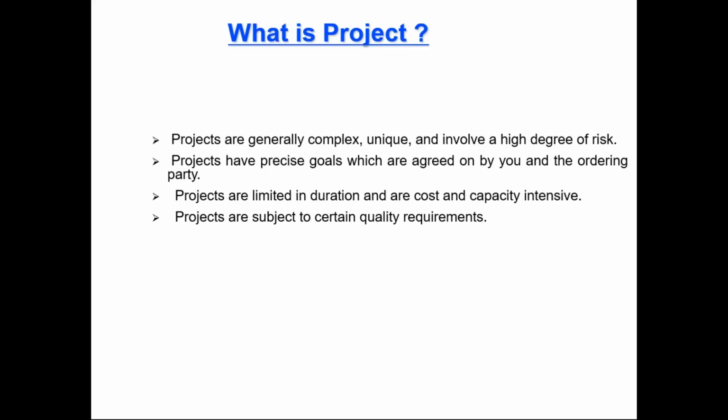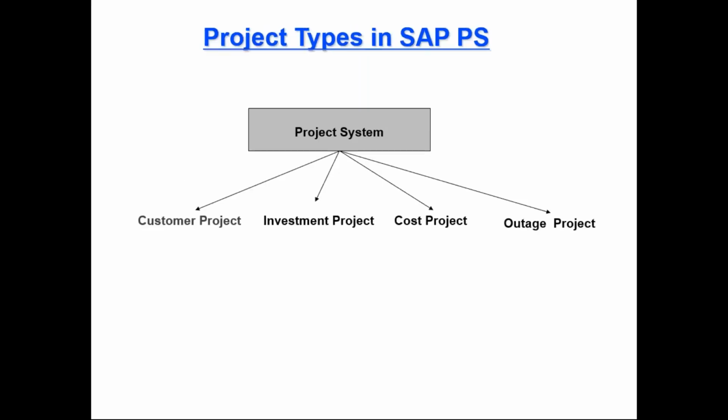So when we are going to start any project formally, I'm saying formally, at that time we should have the project charter clearly defined, which will have the statement of the project, meaning the objective of the project. The stakeholders who are involved directly or indirectly, being affected by and affecting this project, have to be in the document. Apart from that, how we are going to communicate between the different parties has to be mentioned. Your strategies too: how you are going to tackle risk, how you are going to handle the procurement of my project, how you are going to manage your human resources.